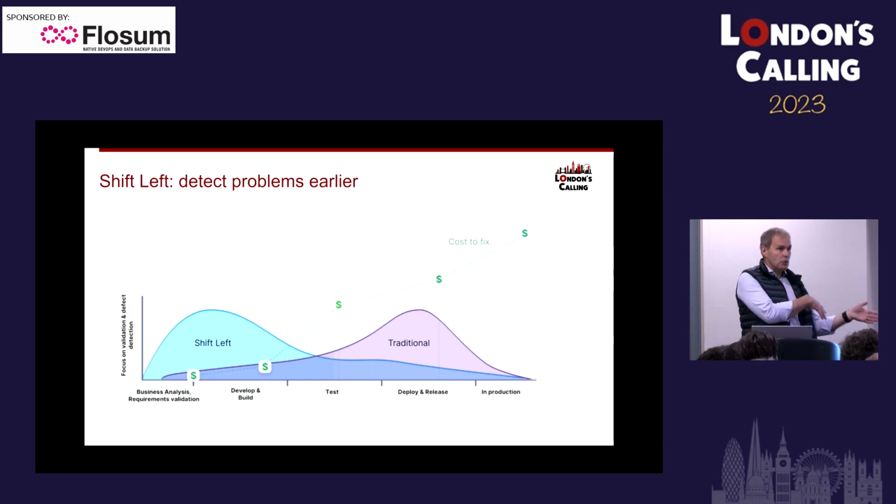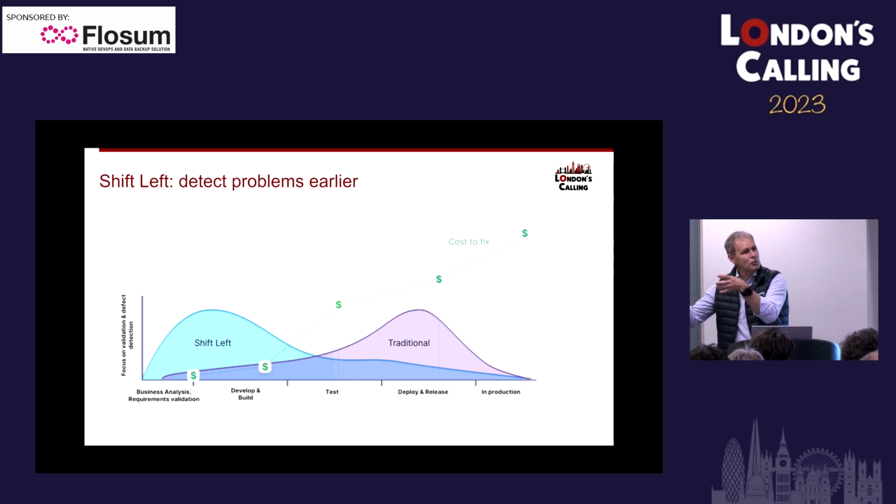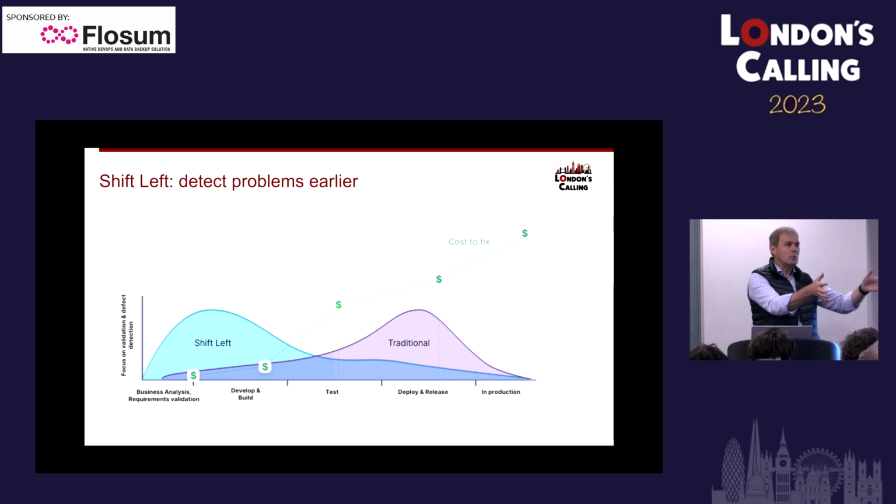We don't use scratch orgs at the moment. We use our sandboxes quite like scratch orgs, and they're very ephemeral. So we use the sandbox for the epic, in effect, but we call it a business value increment because I think epic is too strongly tied to the developer world thinking. There's an increment of value to the business of what we're doing. We create a sandbox to deliver that in. That might have one story, it might have 25 stories. We may well phase those stories. So actually we might have 3 releases, but we'll use one sandbox for that.